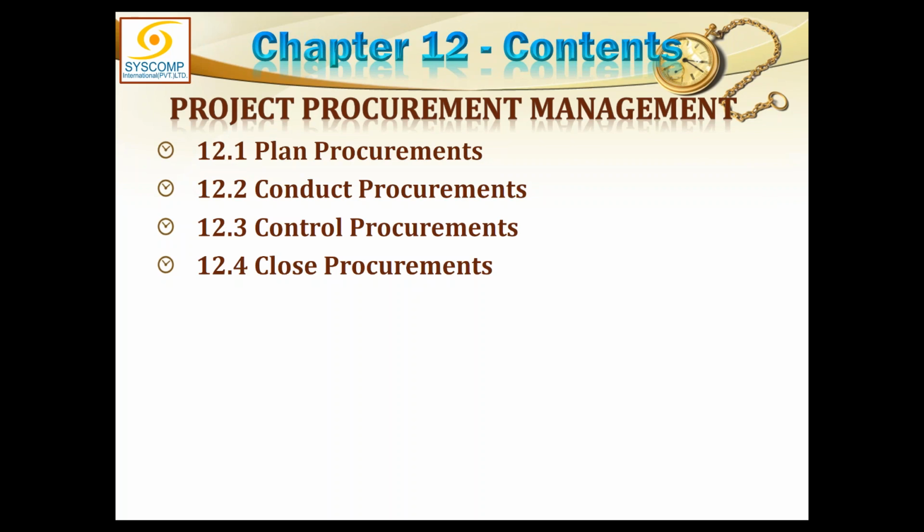and you will also lay out the selection criteria for the subcontractors or the bidders who would be bidding for this project. How would you make the selection? What is the criteria? How many points you intend giving for what specific characteristic or capability of the bidder?